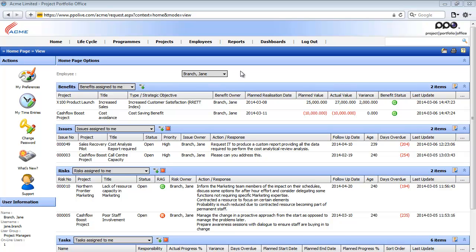Let's start by talking about resource planning. PPL calculates a resource's capacity by taking into account the standard working hours, working days, and public holidays. It then compares this with the time an employee is expected to work on tasks they are assigned to. The results of all these calculations then provide you with an overview of which resources are working over or under capacity.